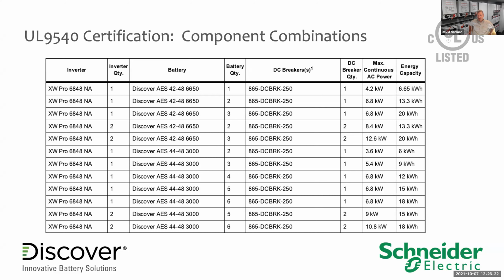Again, all I would suggest to you, and this would go for anybody in the electronics or electrical business at this point in time, is as soon as you have a job or a schedule for a job, book your component orders and get those in the system, because whether it's first come first serve, or even just getting the stuff in early in terms of managing terms, you're far better off to have the product secured early than you are to be scrambling to reconfigure all of your schedules and subsequent jobs as you go along. At this point in time, though, we have batteries in stock, not to the level I would like or am comfortable with, but we are stocking all of our majors fully and fulfilling orders.